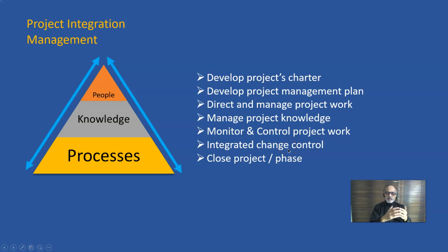In integrated change control, changes cannot be ad hoc. There should be a change management process, and a change request must be raised for every significant change, impact analysis, change control board. So I'll be explaining the change management process in detail through another video, but having one integrated change management process in place and adherence to it helps the integration management. Then formal closure and handover takeover also helps integration management.